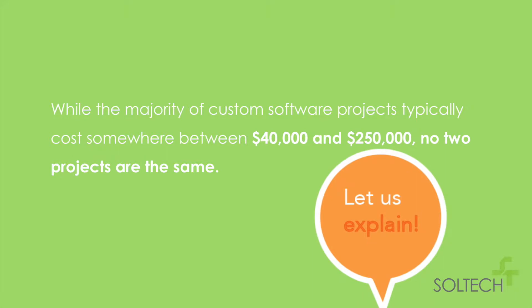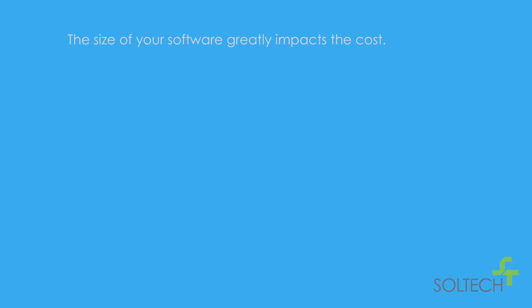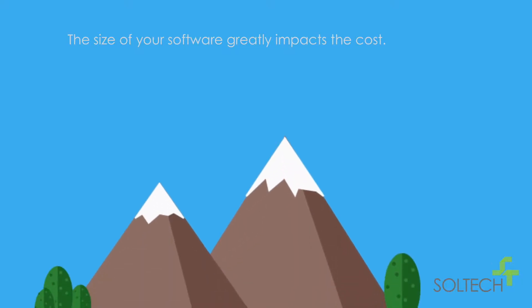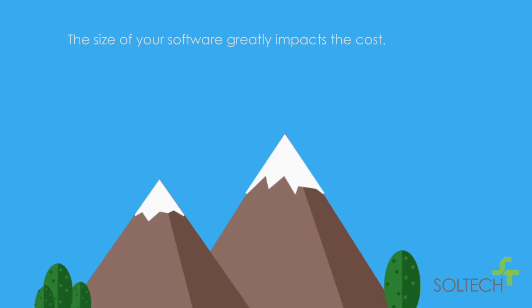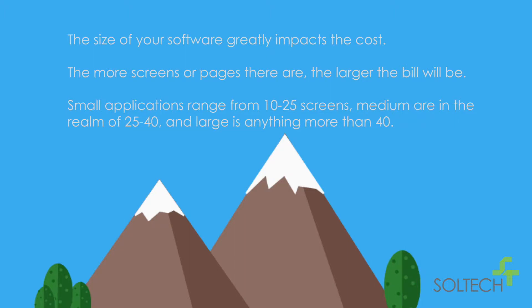That's a broad range, and to narrow it down, let's talk about some of the factors that have the biggest impact on a software project's cost. The size of your software greatly impacts the cost — the more screens or pages there are, the larger the bill will be.